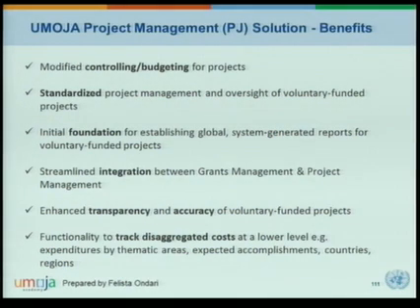Sorry, just to follow up on that, are we allowed to define our work breakdown structures? As said, the project structure templates have been defined by the entities. I'm not sure if you're from UNEP or Habitat. UNEP, so please ask your local deployment team. They have defined the template for the project structure. I'm not 100% sure about UNEP, but what I heard is that some of those entities said the first two levels are predefined, and you can then define the third and the fourth level of the project breakdown structure. But about the detailed guidelines for UNEP, to what extent they have standardized it across the offices, please ask for the template that has been defined for you.